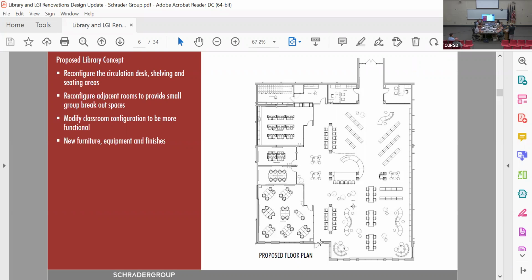Right, and I also think the procurement timeline is really important, similar to when we did the Gasa project. We went out in the fall, and we were able to lock in our pricing then, plus the lead time for ordering HVAC and equipment like that. So whenever we're doing these summer projects, we really need to go out early.